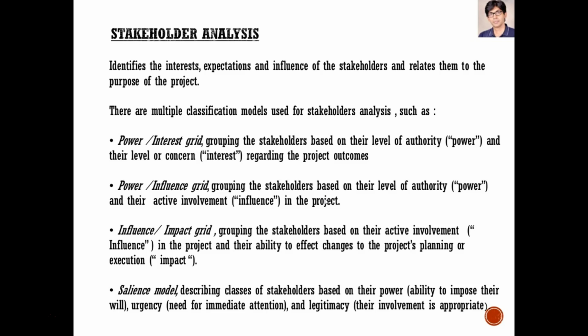So there's a lot of different models out there for stakeholders. And so we're going to look at a couple of them. And a lot of them do this idea of a grid. And so the power interest grid, so how much authority do they have, and their level of concern. So we're trying to create a matrix that way. The power influence grid, which really is very similar. So we have how much influence they can have and how much power they can have. An influence impact grid. So again, we're looking at what their influence is versus what their ability to change that model is.